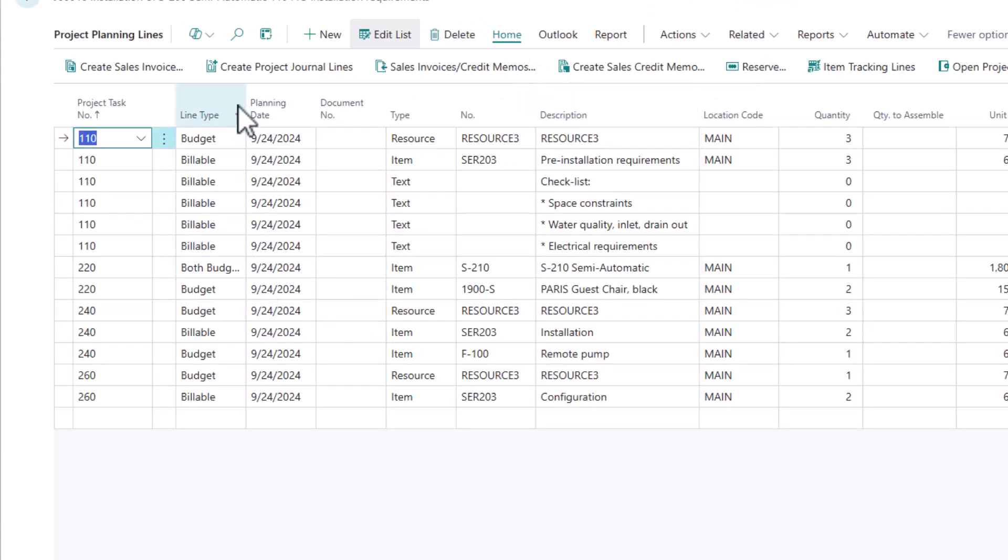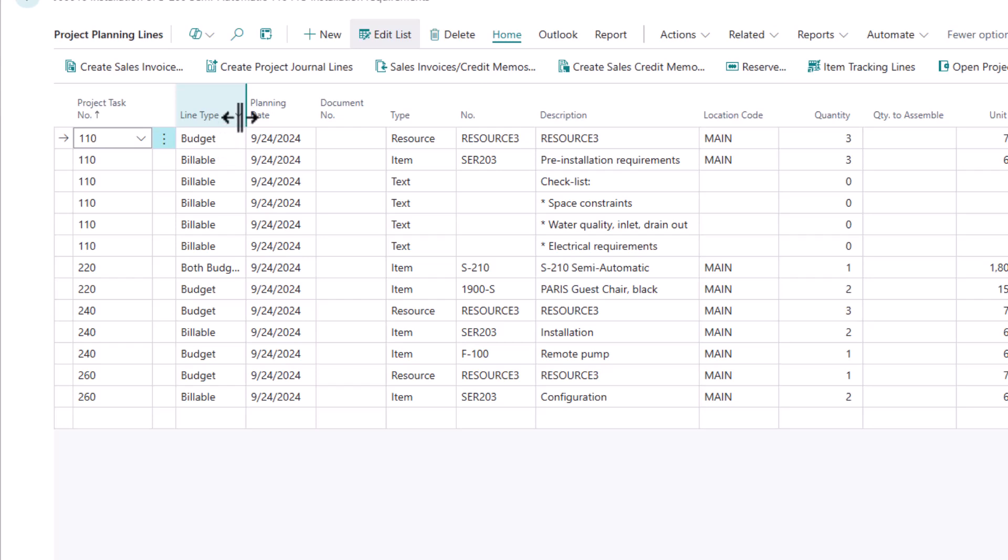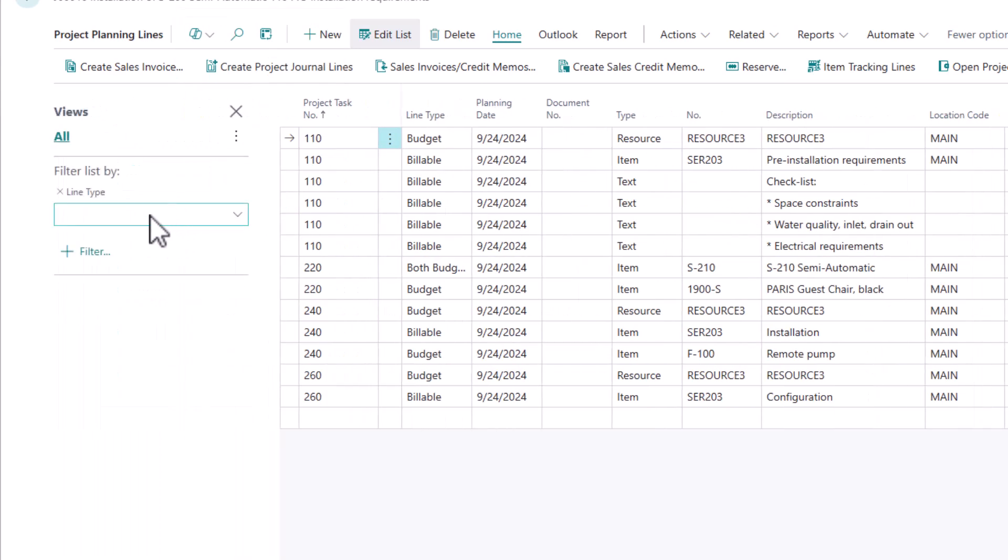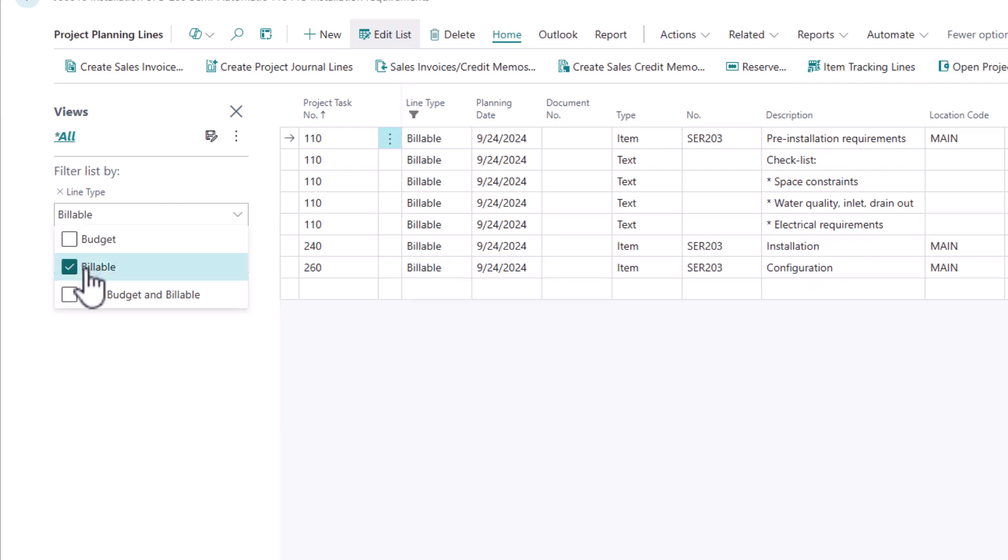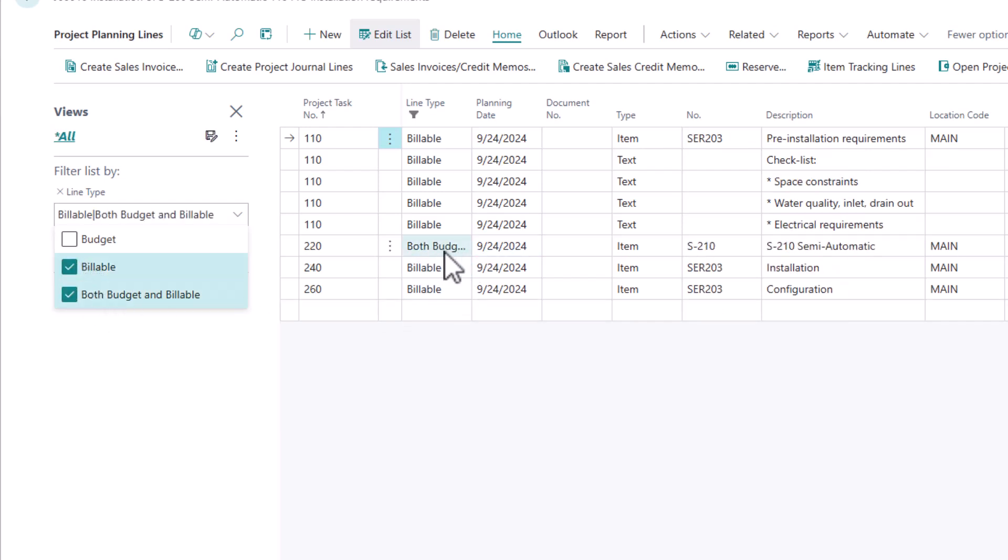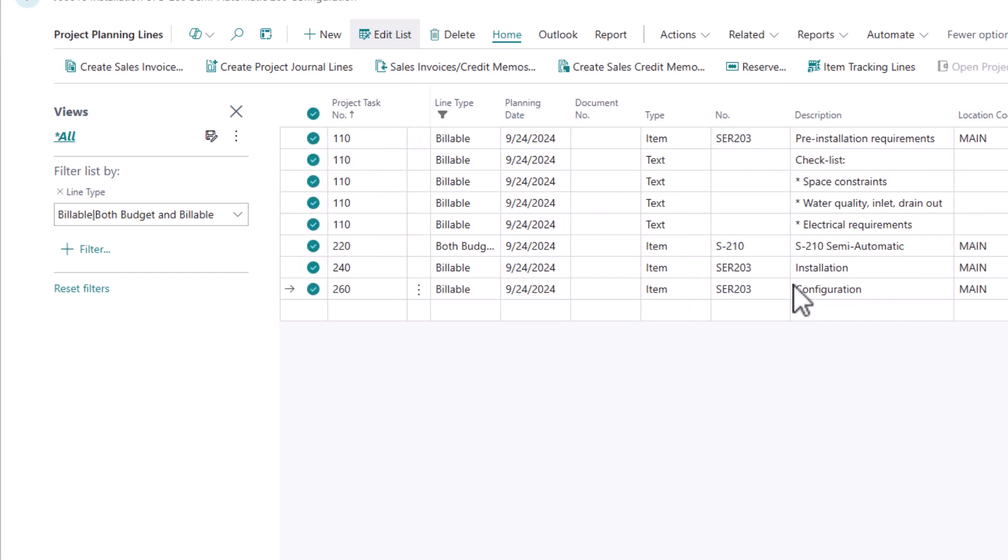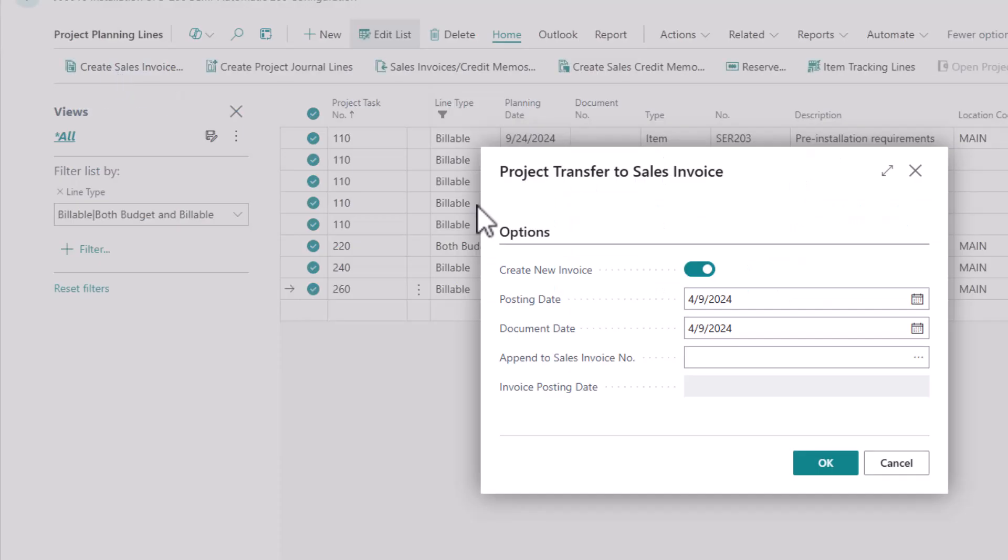And then I want to come up here and filter. Now you do need to be careful. So I have a line that is both budget and billable. I don't usually encourage that type, but I do have one in this case. So when I apply my filter, I can't just apply the billable type. It needs to be both billable and budget and billable lines so that that line is included. Now I have all of the billable events that are going to happen on this project. I simply shift click to highlight all of the lines. And then I'm going to say create sales invoice.